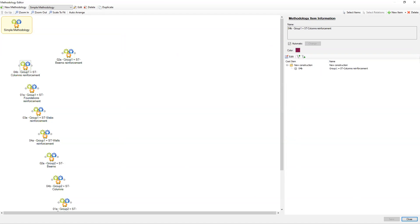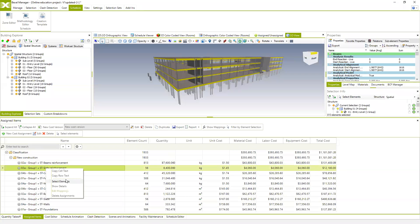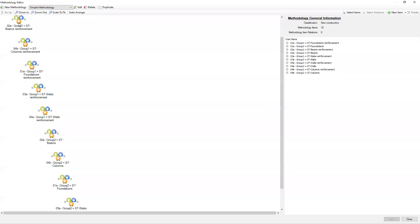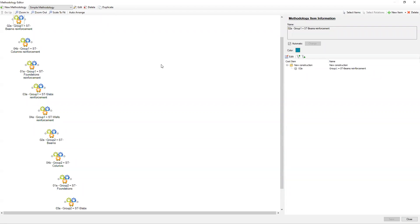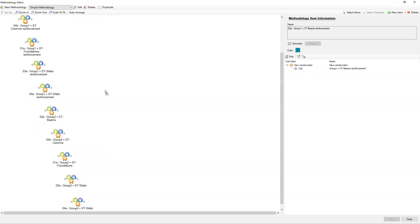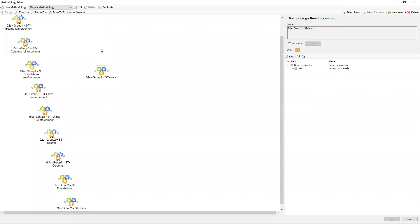I'm going to save this. Because we created a cost estimation, all these cost items are automatically linked to BIM model elements — everything is related. These cost items are related to BIM model elements, and your methodology items are automatically linked with cost items and BIM model elements if you created your cost version. Here we're defining relations between these tasks. Like in the car industry, we're trying to reproduce the same workflow — the line of production — capturing planning logic in order to create relations between activities. It's like a virtual assembly line for the construction site.